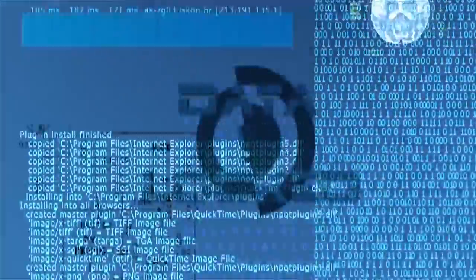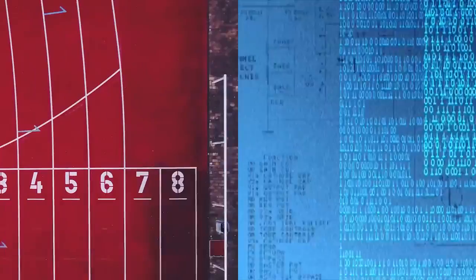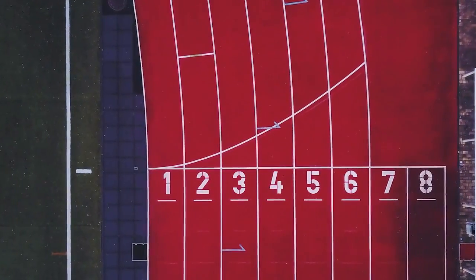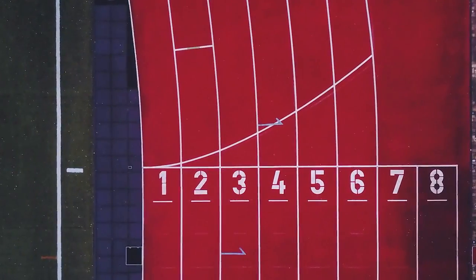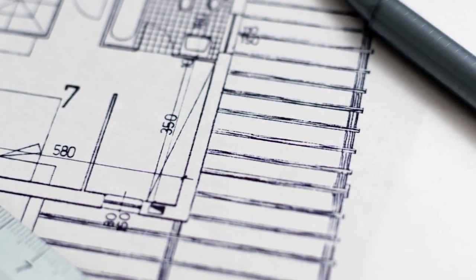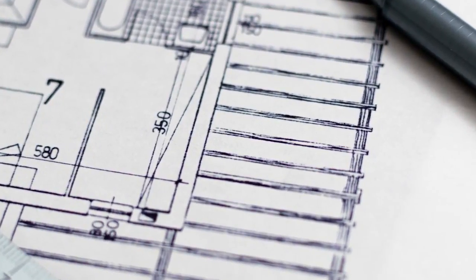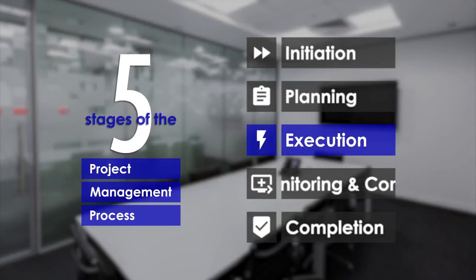As the project manager, you should attempt to determine the likelihood of a given risk occurring and predict its potential impact before it happens. Considering these two aspects together can help determine the priority of mitigation efforts. Once the schedules and plans are developed for the project, it's time to move on to the next stage: execution.